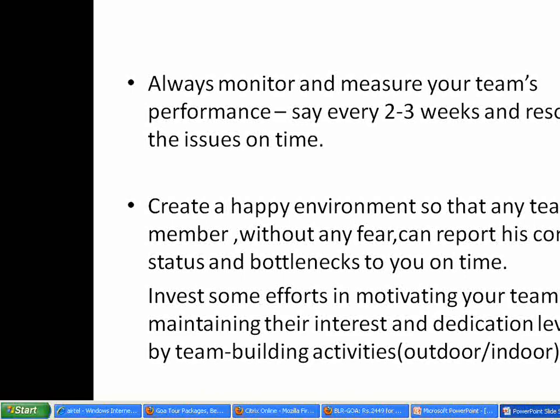Somebody has asked about risk management and project management. Risk management is one of the items in project management. Project management is everything from the start of the project till its successful completion. But risk management is analyzing all types of risks, technical, business, functional, financial, any risk which your project can face, which might prove to be a bottleneck in the completion of the project. How to mitigate those risks? Every risk has to be given some priority. Focus first on those risks which have a higher priority or more impact on the project health or the client's revenue, and then concentrate on those with lesser priority or lesser impact. So it's very important to prioritize your risks.